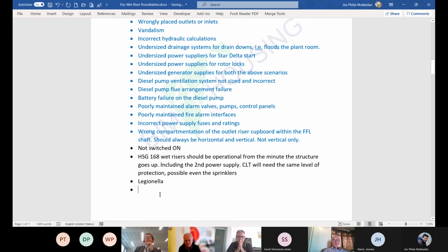Because you forget, unfortunately, if you do multiple subjects, you forget stuff. It's like crazy. So PCSA being a pre-construction service agreement. Yeah, it was alluded to earlier, and this is all about procurement. If you're friends with the client and bring people in for a PCSA, you can bring in sprinkler companies and others to aid the designer, to supplement the MEP designer. Because as we said earlier, they don't do fire dampers, they don't do sprinklers, they don't do all of that specialism. The specialists do that, but you can then feed it back in.